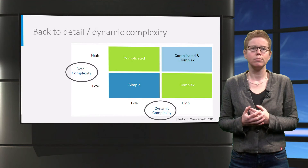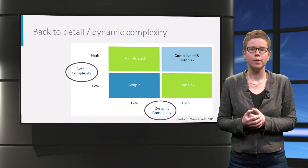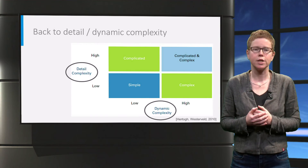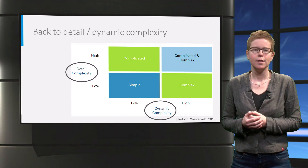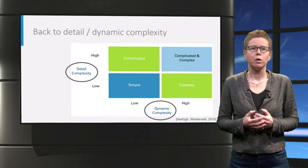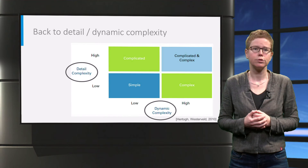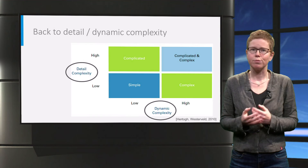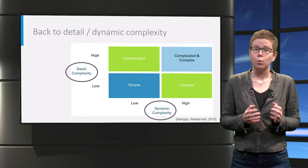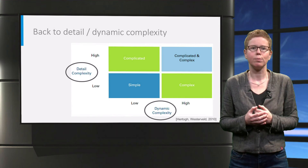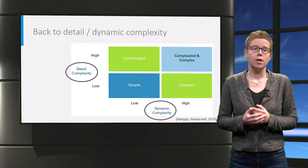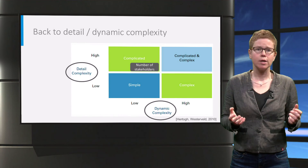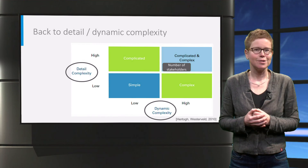Let's now go back to the 2x2 model of Hertog and Westerveld. They distinguish detail and dynamic complexity: detail complexity is characterized by a high number of components with a high degree of interrelatedness, and dynamic complexity by the potential to evolve over time and limited understanding and predictability. They say that only when uncertainties are involved can one speak of real complexity, because this cannot be simply decomposed. Mapping the TOE framework elements to the detail-dynamic dimensions helps determine which approach would be effective to manage specific complexity. Where TOE elements fit is very much context-dependent — in one project, the number of stakeholders might be placed in detail complexity, whereas in another it could be in dynamic complexity, or a combination of both. This is no exact science — it just depends.